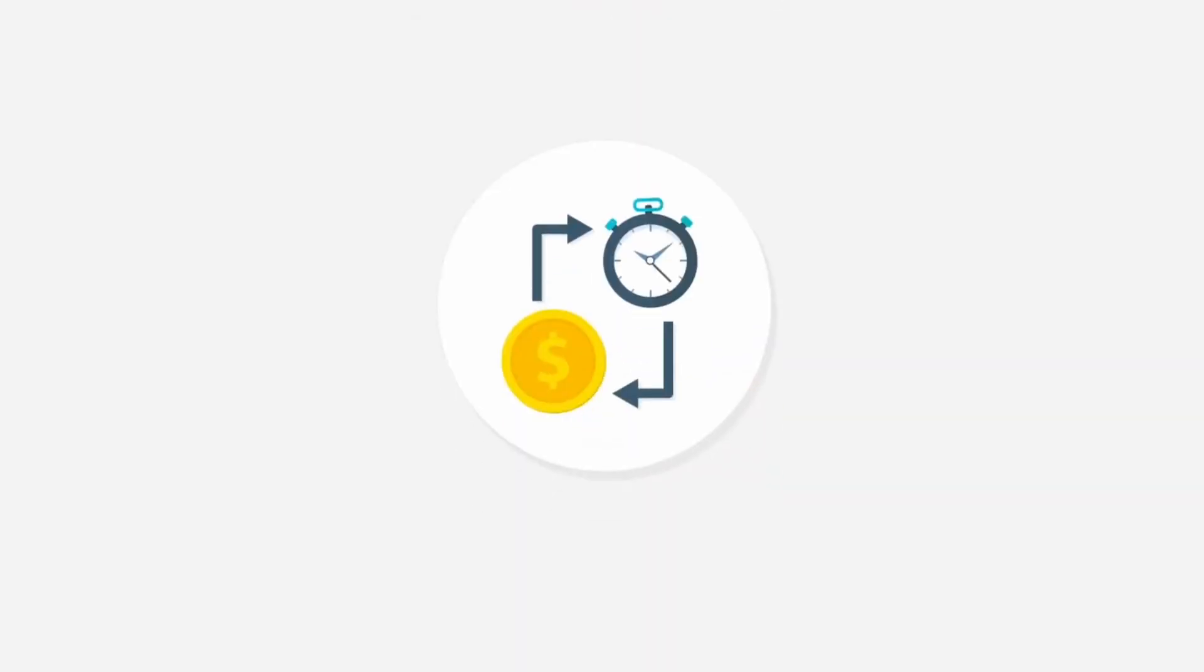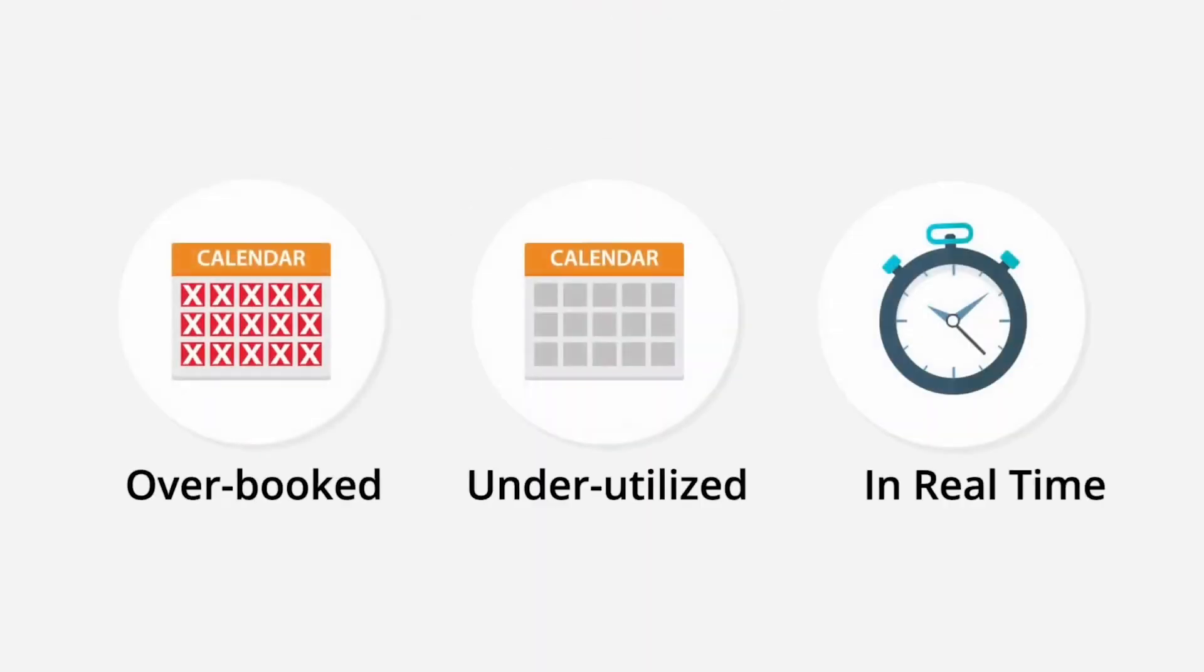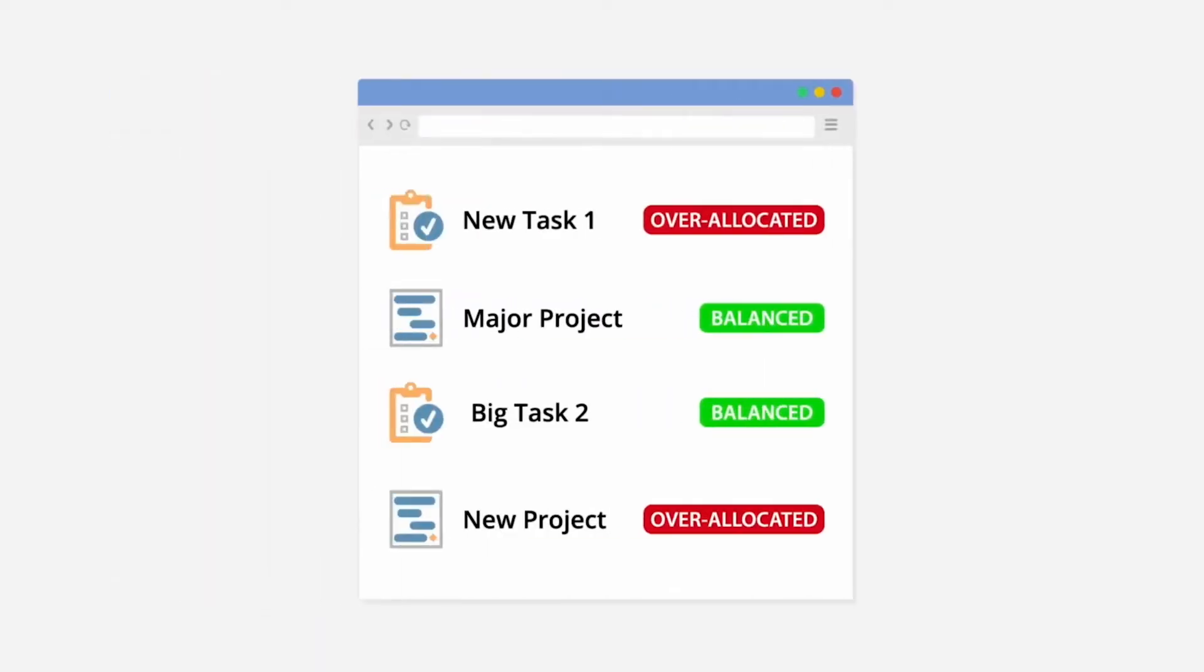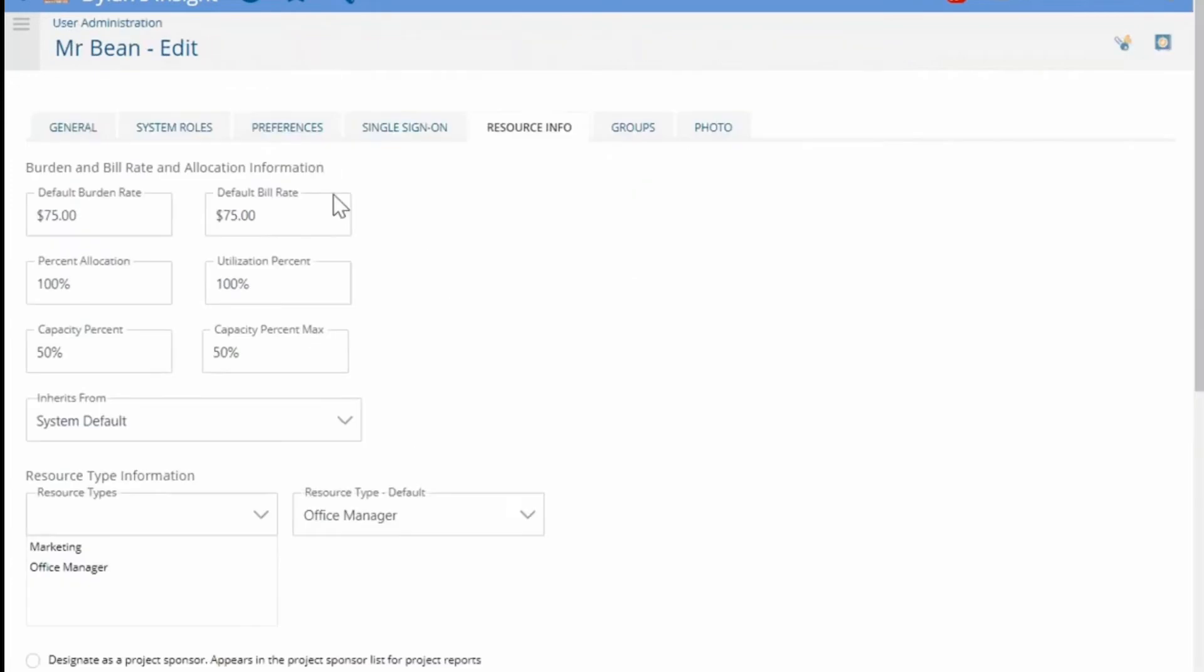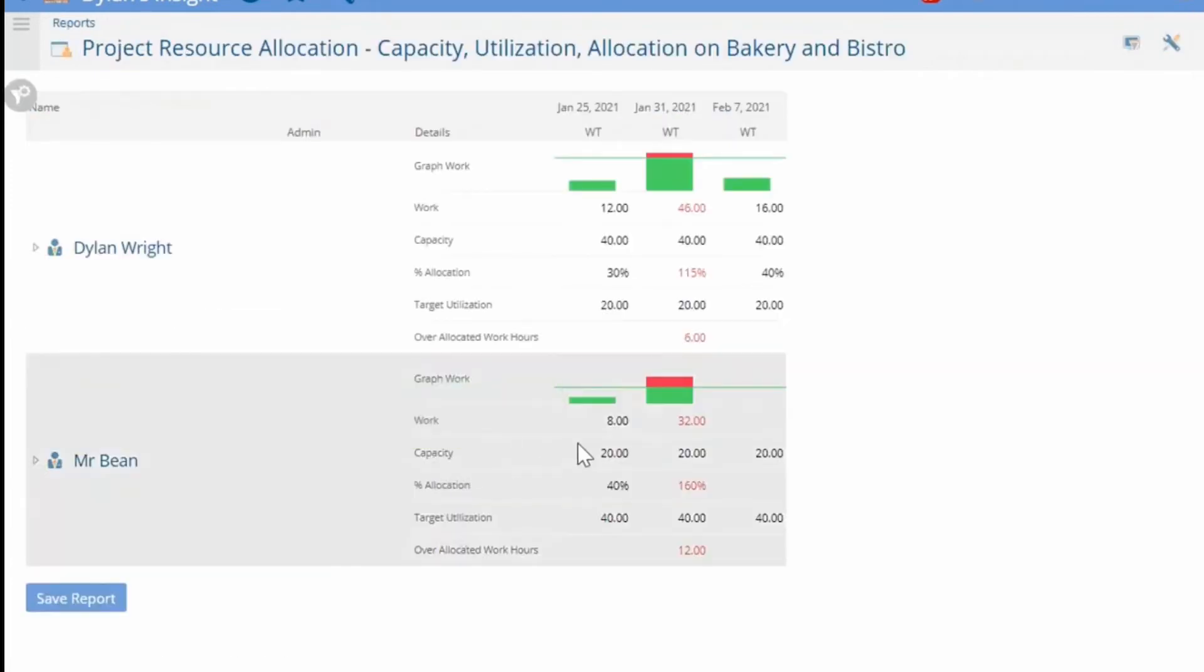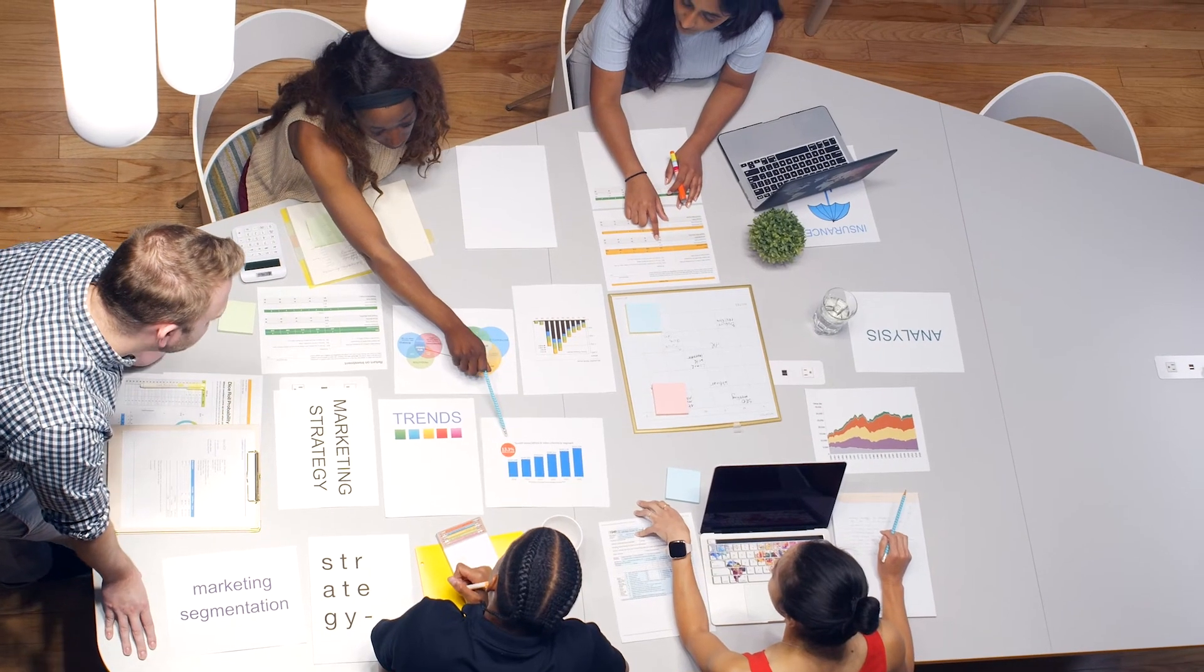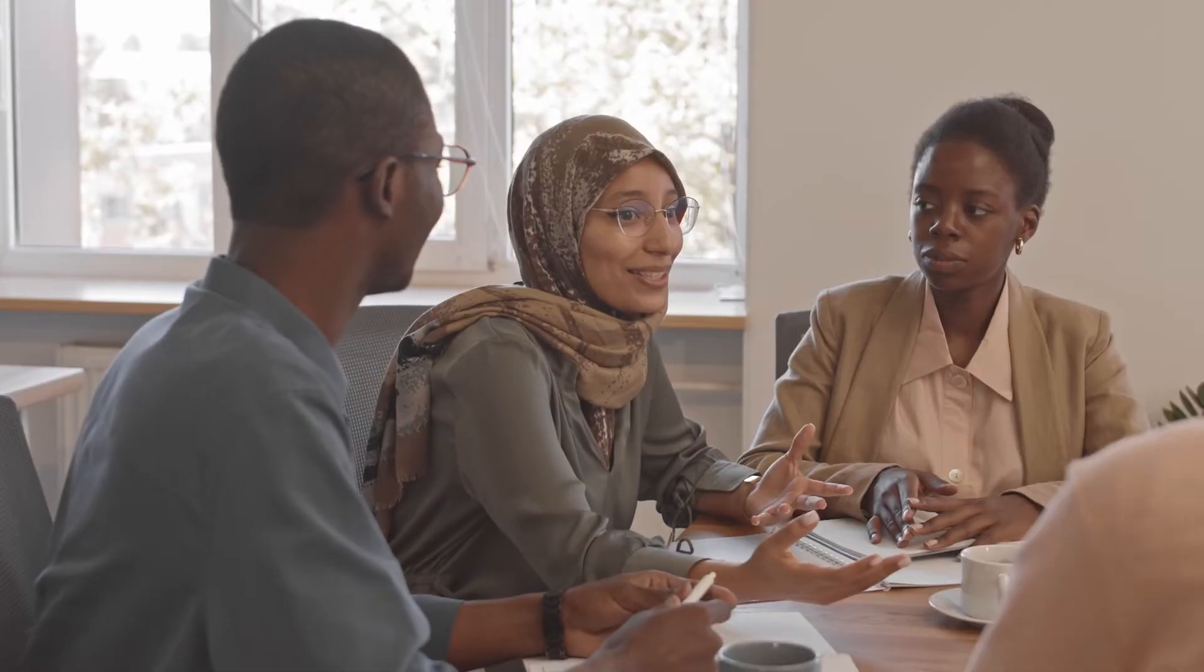With PI, users can gain visibility into the organization's capacity and effectively monitor and balance resource workloads across multiple projects. Users can swap resources on tasks with the drag and drop feature to balance the workload. It enables mass assignment of team members by skill set and assigning them to projects by group, department, or company.